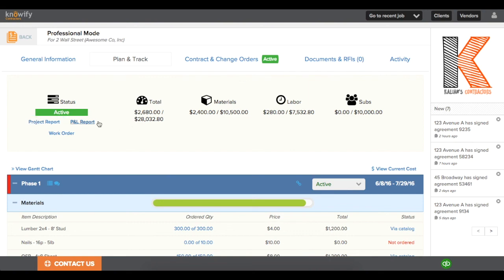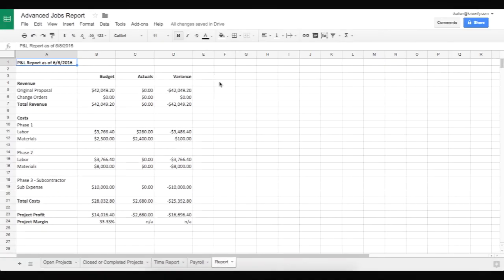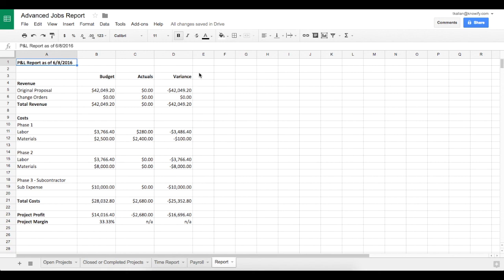And since we budgeted at a phase level, we can also print out a P&L report that will show you the variance of your actual cost versus your initial estimated cost for each phase of the job.